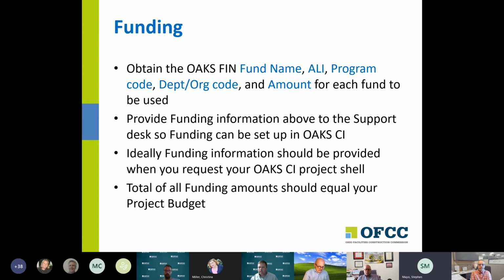Barb has mentioned that in some cases, the agency may not have that all set up in OAKS until after controlling board. So there may be cases where you know where they're getting their money from, but we don't know what these codes are yet. And in those cases, we would have you provide them once they were available. Again, they need to be in there before a purchase order can be logged. So it behooves us to get that information and get it put in a timely fashion.